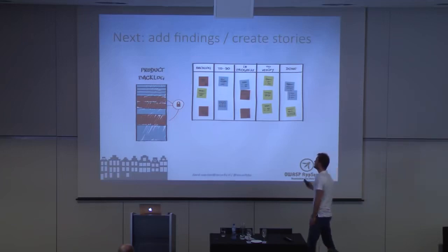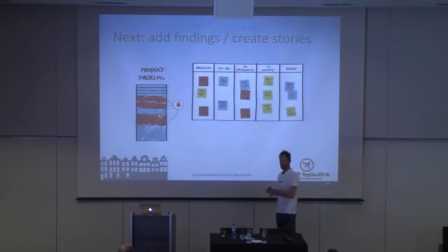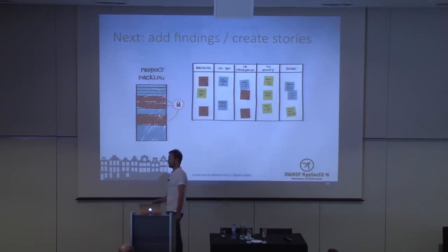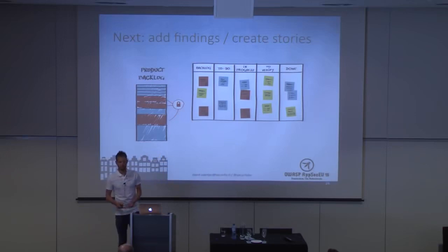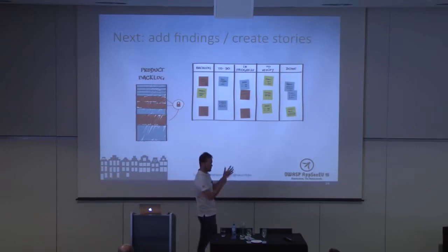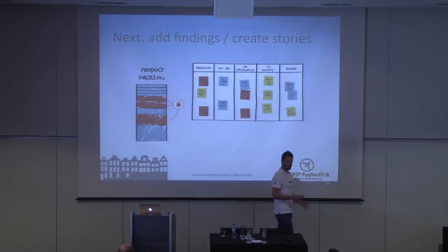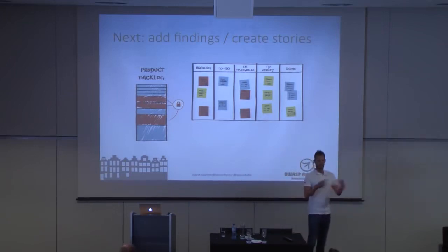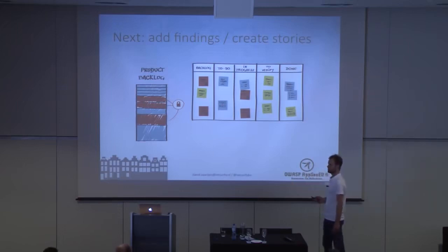So all the security findings we did, we just added them to the boards, just as defects or security bugs. And for all the things that we think need structural improvement, like using a different XML parser, a different templating engine, having choke points for input validation, using API modules and so on, these are security depth kind of things. We just added them to the storyboard.